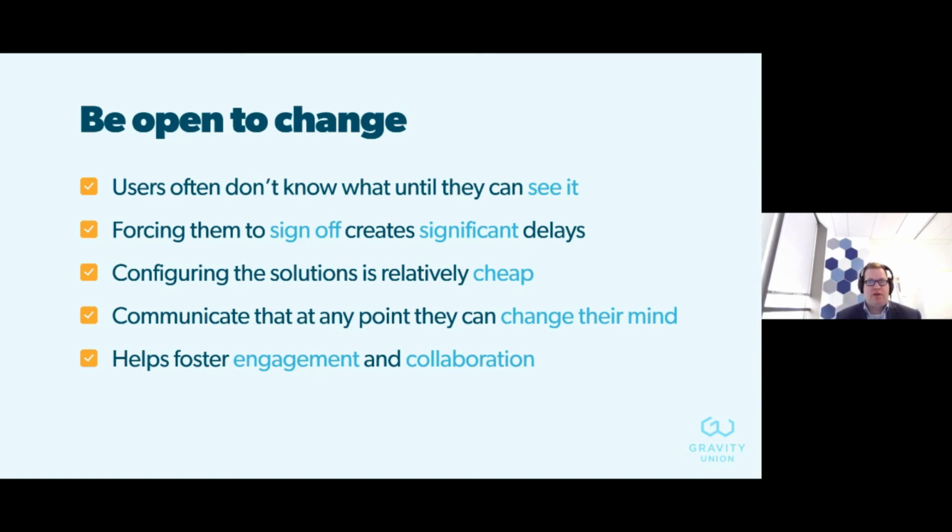So you actually have to work that into your communication strategy. Hey, look, if you're not happy at any point during the process, we'll go ahead and change that for you. And although that sounds scary to a lot of project managers that don't want this open-ended thing of constantly people changing their mind, the reality is, because those end users are there for the entire journey, giving you feedback, constantly course correcting, the risk of you completely missing the mark on where the solution needed to go is quite minimized. And so if we get rid of that notion that we have to have it stage gated and we have to have sign off, there's no changes after the fact, we'll just keep on changing it as much as you want, it gets the guard down on the business and makes it more collaborative.